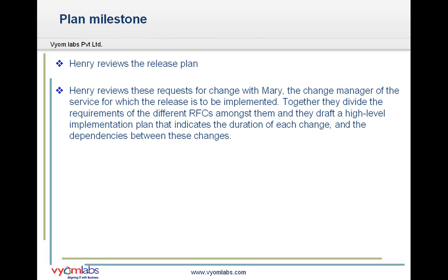Henry reviews this request for change with Mary, who was the change manager of the service for which the release is to be implemented, that we have seen earlier. Together, they divide the requirements of the different requests for change amongst them, and draft a high-level implementation plan that indicates the duration of each change and the dependencies between these changes.